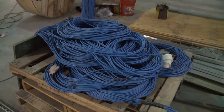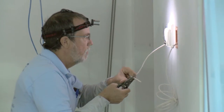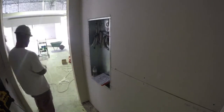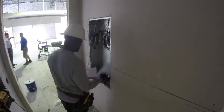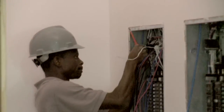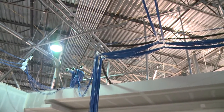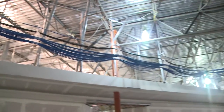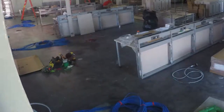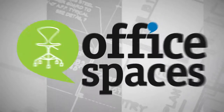the building. We need to have a complete picture of the entire jigsaw puzzle first while we're still working in pencil, not in concrete. Everything from the building management systems, the HVAC controllers, the monitors on the wall, the microphones in the conference room for telepresence. Compile the specifications and the needs of each vendor, and then we figured out how it was actually going to go into the building. Sometimes wires ran overhead, sometimes they ran in the floor, sometimes they ran up the walls. All the high-tech equipment that will be installed requires miles and miles of low-voltage wiring.